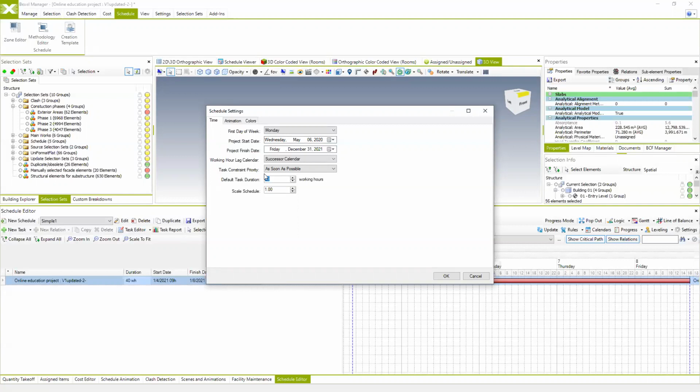So instead of doing that type of impossible calculation, we are trying to tell the system to use a specific pace for each task. And then based on the pace, you can adjust your resources on the entire process in the entire project. This is more important. And here we're gonna specify that default pace, which is 40 working hours, or practically 5 working days.